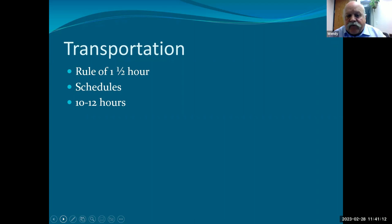When we cost out field work, even in the environmental business, any day in the field is really a 12-hour day. Keep the travel time to a minimum, and if you do that by locating your crews closer, that's absolutely intrinsic to the thinking of your drill crew — they won't go further than that.